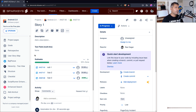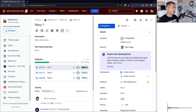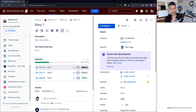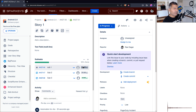Whenever you are moving your issue in your workflow to the last status, make sure that in the last status or the transition to the last status, either you have a transition screen where you have the option to populate the resolution field, or based on the transition itself you can automatically set the resolution.